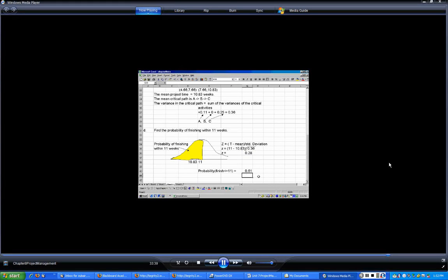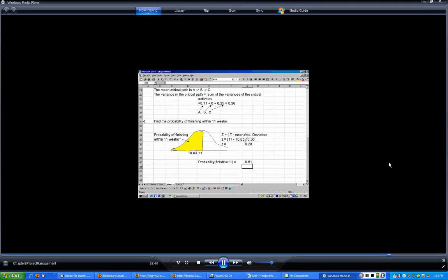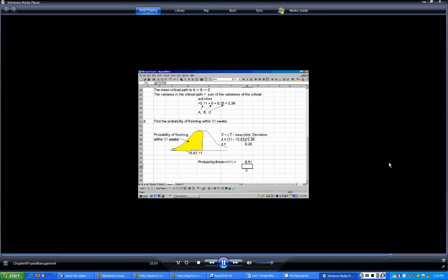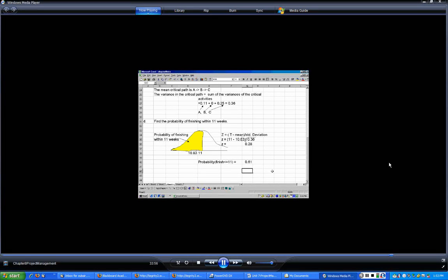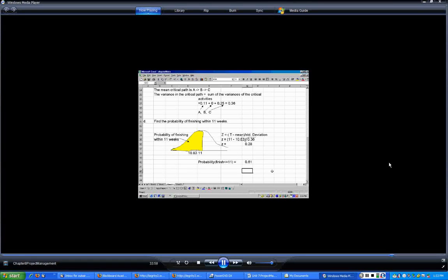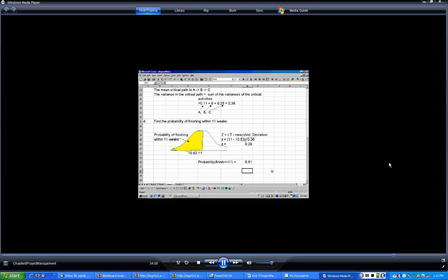There is about a 39% probability that the project would take more than 11 weeks. But there is a penalty of $500,000 if the project is not done in 11 weeks. So the probability that Bill Fredlund has to pay this penalty is almost 40%. In other words, if this person goes through building 100 projects like this, about 61 projects he would finish in 11 weeks. There are about 39 projects he would have gone over 11 weeks and would have paid $500,000.